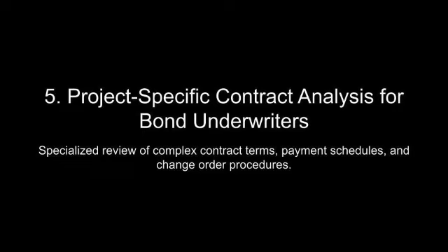At the heart of change order management lies the process of authorization. Most contracts establish a hierarchy of approvals to ensure that changes are reviewed and sanctioned by appropriate decision-makers before implementation. This hierarchy is designed to protect both the project owner and contractor from unauthorized modifications that could escalate costs or disrupt project timelines. For example, a typical structure may require project managers to initiate the change order, followed by review and approval from senior executives or external consultants.